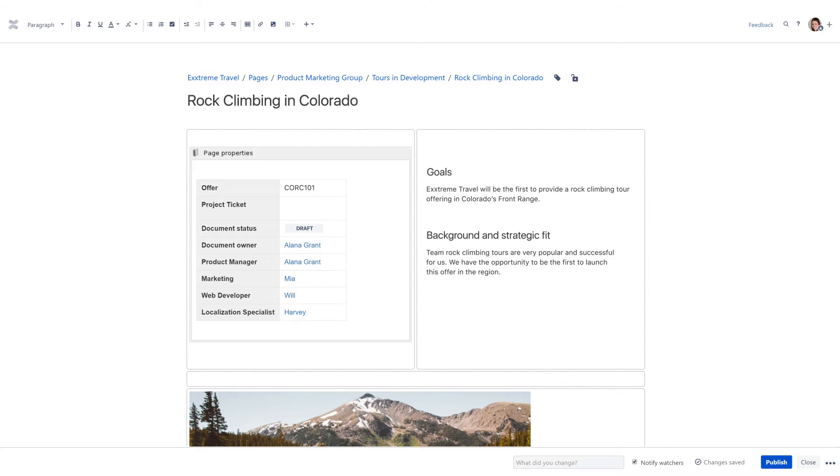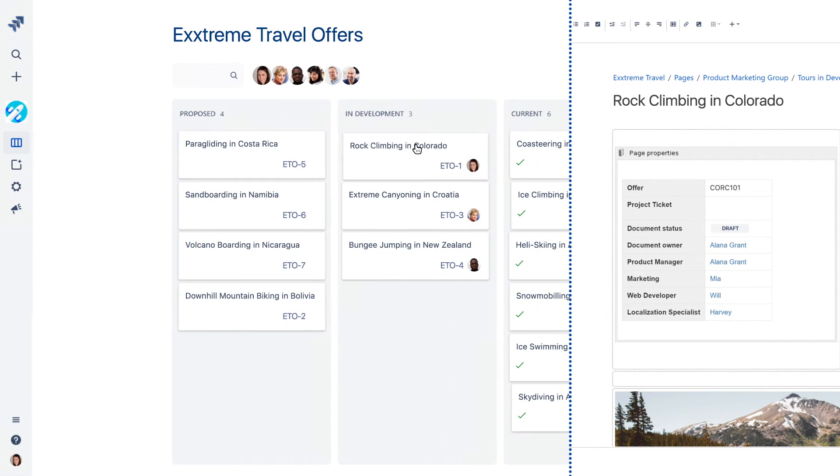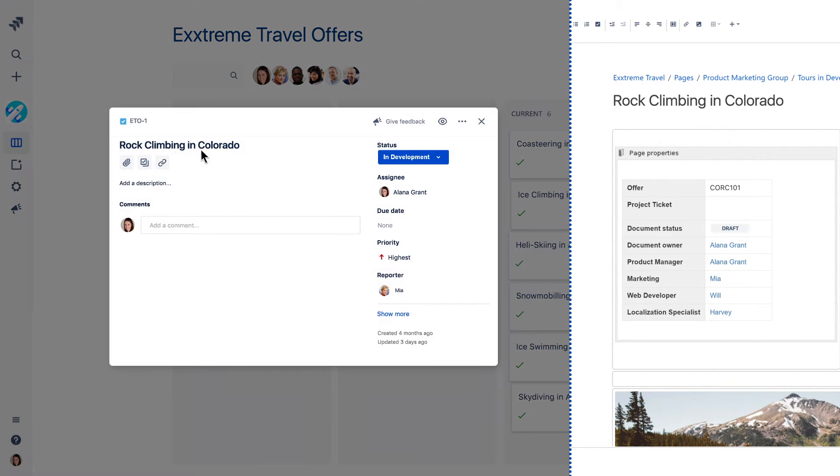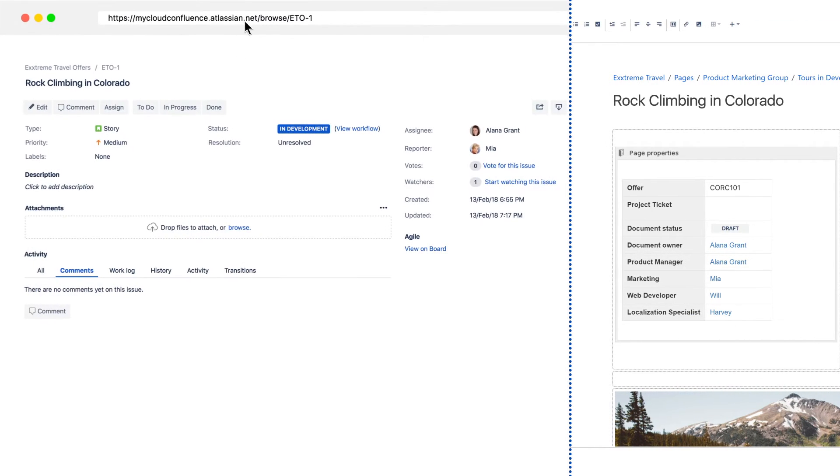Tracking a single Jira issue to your Confluence page is as simple as copy pasting the Jira issue link.